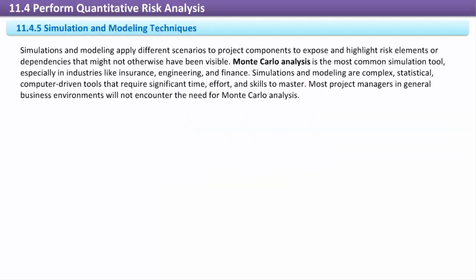Simulation and modeling techniques. Simulations and modeling apply different scenarios to project components to expose and highlight risk elements or dependencies that might not otherwise have been visible. Monte Carlo analysis is the most common simulation tool, especially in industries like insurance, engineering, and finance. Simulations and modeling are complex, statistical, computer-driven tools that require significant time, effort, and skills to master.